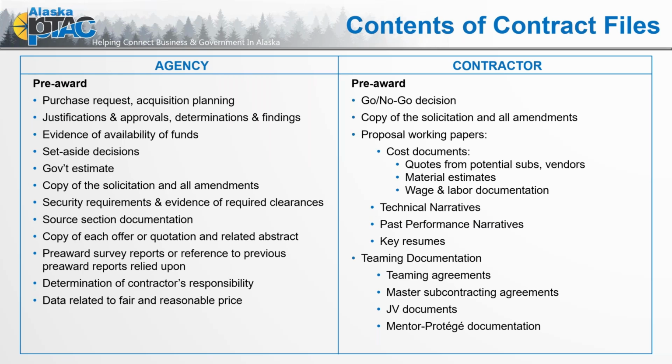Back on that contractor side, we really do have, while it's not necessarily word for word exact, but we should, in our contract records, have a copy of the solicitation and all amendments. And often once it becomes a contract, it should be fairly identical. Of course, all your clauses, your provisions, sections L and M, section K, L and M, I believe, because the reps and certs, all of those fall off.